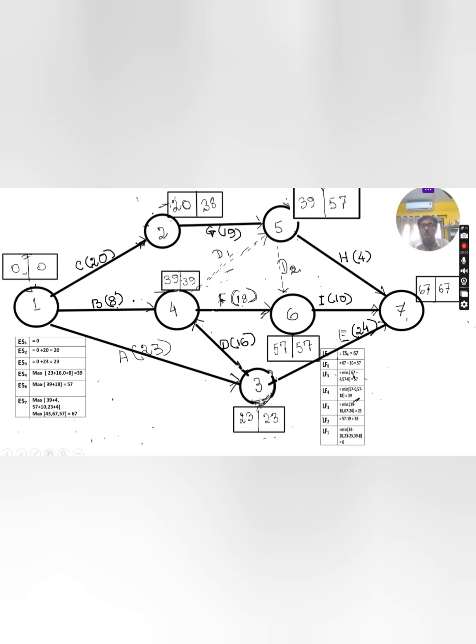Now S3, more produce. Which are the activities emanating from this node? This is 3-4 and 3-7, both have to be completed. So the latest finish time here is 67 minus 24, that is 43, and 39, latest finish time, minus 16, 23.